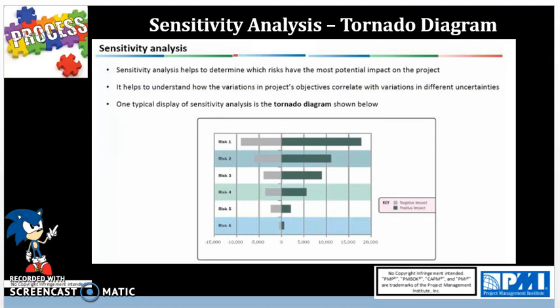Basically, we have probability, which is a percentage, times the impact, which is in dollars, for risks and opportunities. For positive risks or opportunities and negative risks or threats, the dollar amount is going to be negative for a risk or threat and positive for opportunities. So we'll be multiplying the probability times impact to get the value.